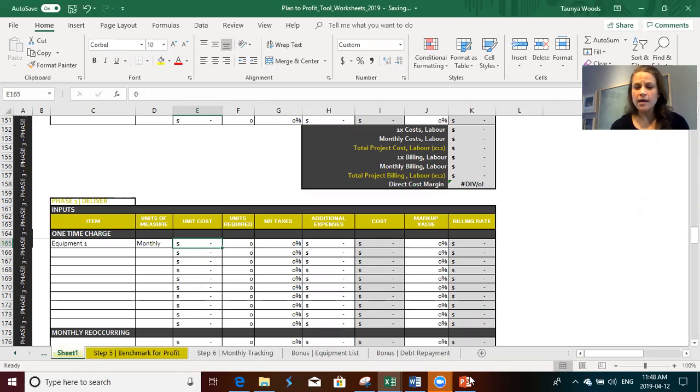So you can go back and, you know what, it's going to take me too long to find it. But if we go back to the truck, I think the truck equipment cost per month with everything in was $1,700, right? And you're going to say, oh, well, this project is going to require it for 1 month. That is money that you haven't been pricing based on. It's just been sitting and operating. So that equipment is attached to that specific product or service for that amount of time. So I hope that makes sense for everybody.